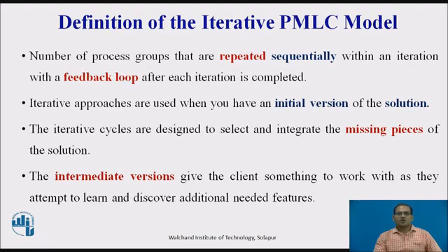Iterative approaches are used when you have an initial version of the solution, but it is known to fall short in terms of the features and functions. The iterative cycles are designed to select and integrate the missing pieces of the solutions or to add the new features. Think of the iterative PMLC model as a variant of production prototyping. The intermediate solutions are production ready, but they might not be released by the client to the end user until the final version is ready.